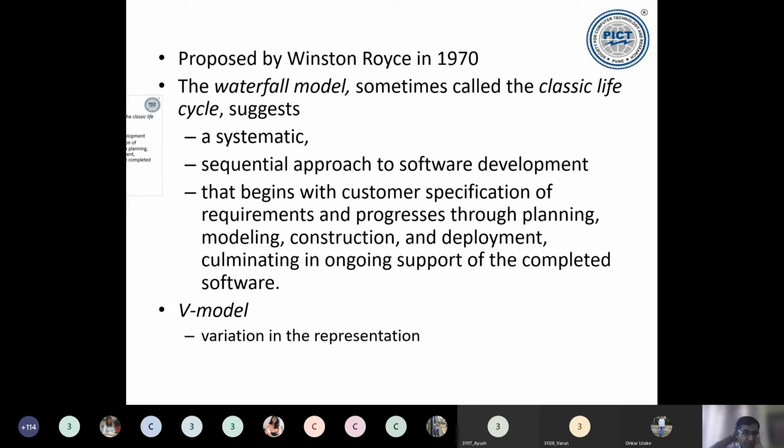Even if you spend, say, 50% of time, it doesn't mean that your over-costing will be zero. There will be cost overruns, but they will be less. So considering the entire project time, spend at least 10% of the time on requirement gathering.